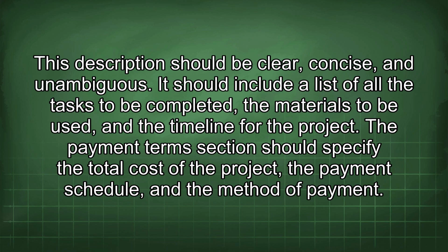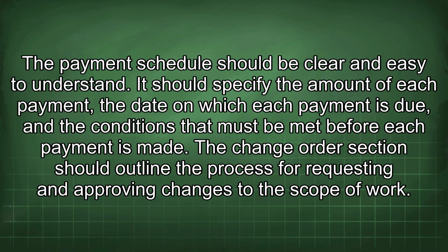The payment terms section should specify the total cost of the project, the payment schedule, and the method of payment. The payment schedule should be clear and easy to understand. It should specify the amount of each payment, the date on which each payment is due, and the conditions that must be met before each payment is made.